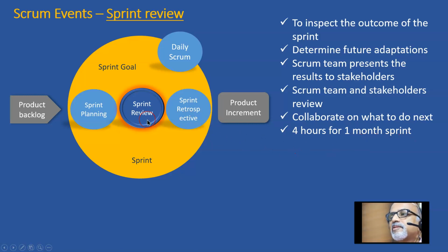So sprint review meetings are 4-hour meetings where the increment of the product developed during the sprint is demonstrated to the key stakeholders, and somebody verifies whether this developed increment of the product satisfies the definition of done. If all the features planned within the sprint satisfy their definition of done, then we say the sprint is successful.